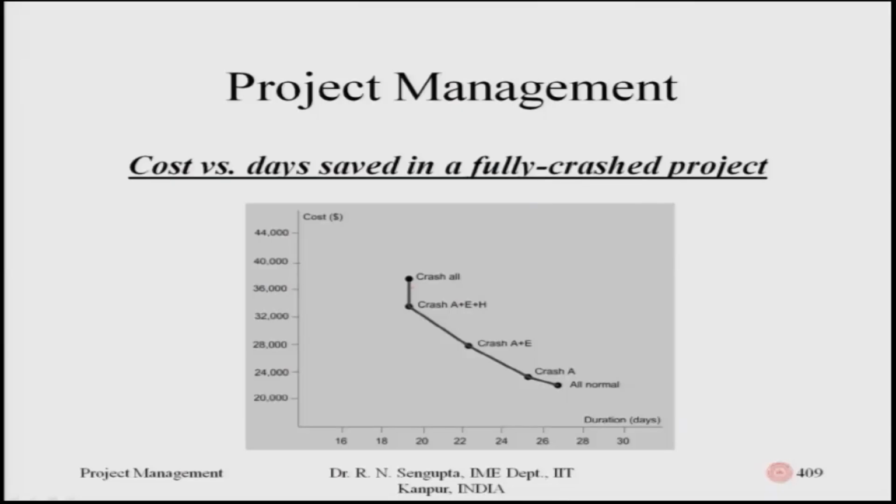Technically, if I want to find out the rate of change of the cost structure for a 1 day reduction, I will join the points per day. This would be the per day decrease along the x axis. So, I will join these points in such a way that this graph is best replicated by the bold set of points.